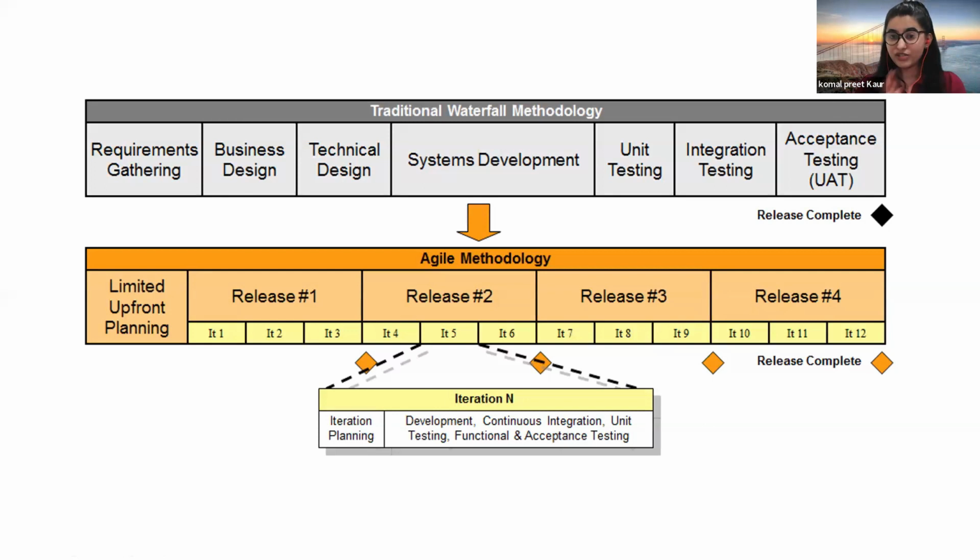Although the waterfall methodology has some merits, I would say it has more disadvantages. There is no involvement of the customer, because if I take the example of 6 months, for those 6 months no customer can see what is being built or what the team is working on. Priya is our end customer, or client, I would say. So Priya can see only after 6 months what has been built. This is the first disadvantage of waterfall.